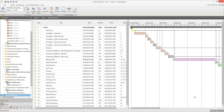After a few moments the build program will appear on screen. On the left hand side of the screen you will see the task list, and on the right hand side you will see the Gantt chart. You can scroll across using the scroll bars at the bottom of the window. You can easily change the start or end date of tasks or move tasks on the chart. Note that altering the task lengths does not change the labour calculations in the estimate. However, changes made in a build program will appear in your just-in-time schedules, cash flow and profit forecasts.